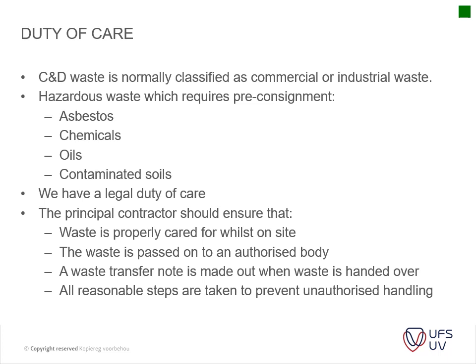Construction and demolition waste is normally classified as commercial industrial waste. Waste which requires pre-consignment includes asbestos, chemicals, oils, and contaminated soils. I've worked on one project where we had to take off asbestos — it's a schlep. There are only about four contractors in the country that do it, so it's highly specialized work and they usually ask a lot of money for it. So if you're pricing a project and you see there's asbestos, immediately start asking questions — is there enough money allowed for it? Identify it as a risk when pricing your documents.